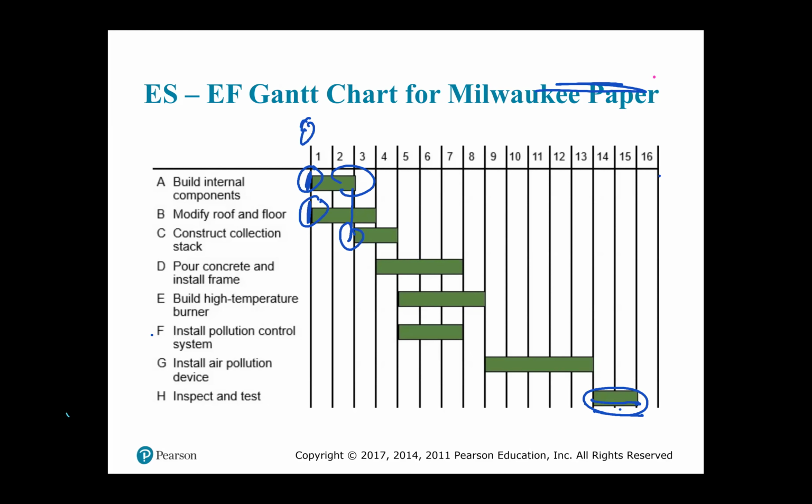And so activity D will begin where activity B ends. So here is activity D beginning where activity B ends. And you'll have activity E beginning where activity C ends. So the same precedence relationship reasoning is used in the Gantt chart as you would in the network, because remember I said the Gantt chart is regarded as the father of the network, right?